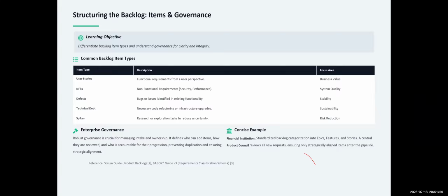Like one of the practices we adopt in my organization is that if you have a backlog item in the backlog for more than a year, right, it is assumed that either business exigency no longer requires that particular item, or technology does not support it, or there are newer features that are better than that feature. Remember, we said it's about priority.